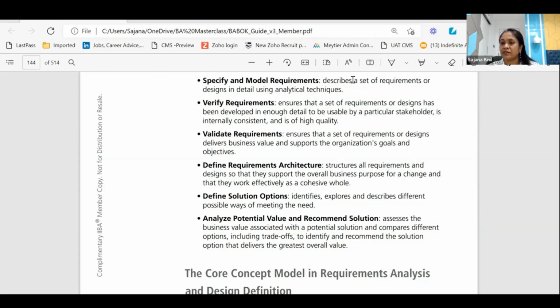And all of this is possible if you're using a tool where you can mark the dependencies between requirements. You can ask your Jira administrator. In the current Jira interface, you will not see any parameter that helps you link one user story to another user story. But you can ask your Jira administrator to configure that, and we can have an additional field by which you can connect two user stories together. Okay. You can do that.